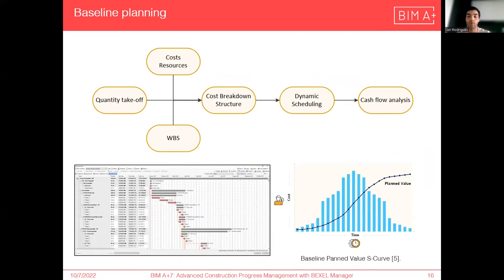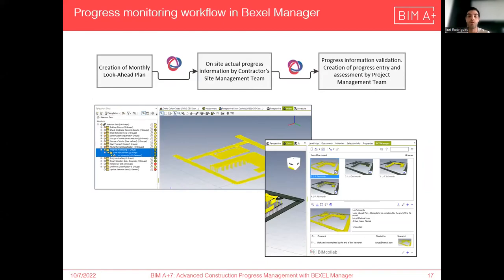Finally, everything is integrated in one single platform, enabling better planning, visualization, and monitoring, facilitating the progress management. As the construction phase starts, the progress monitoring starts as well. In this example, it presents the progress tracking of works completed on a monthly basis. For this workflow, we start by creating monthly look-ahead plans with element selection sets that are sent to site using BCF files.